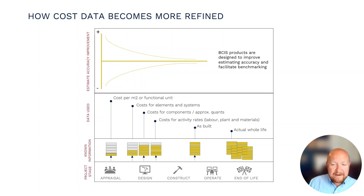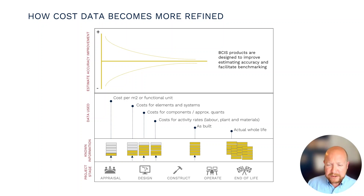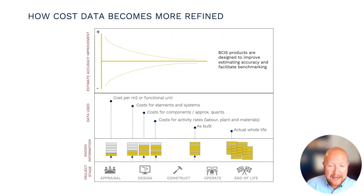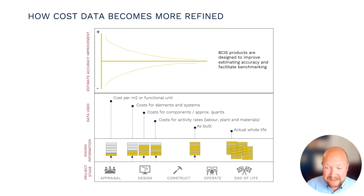Here we have a cone of uncertainty — a kind of funnel leading us through greater accuracy towards the holy grail of absolute cost certainty, which of course none of us can ever attain. At the appraisal stage, tolerances in our cost estimates can range quite considerably — above or below, in some cases well over plus or minus 50 percent. As we get more information, the more accurate those cost predictions become.